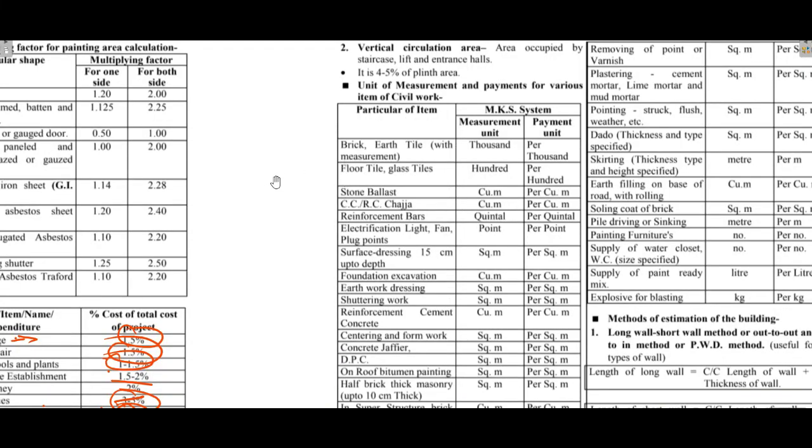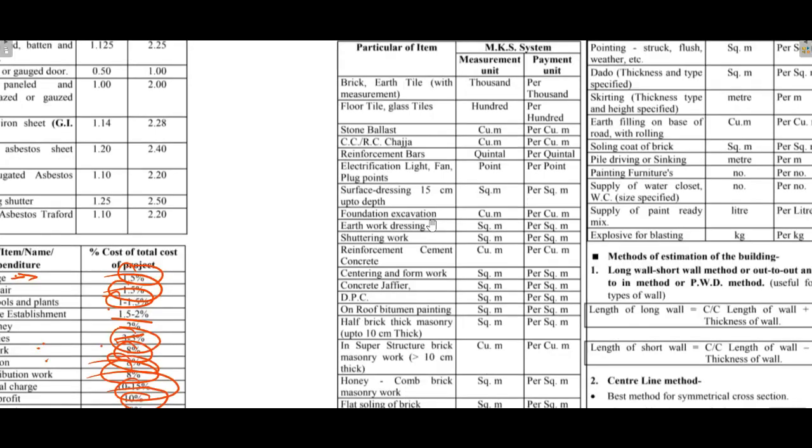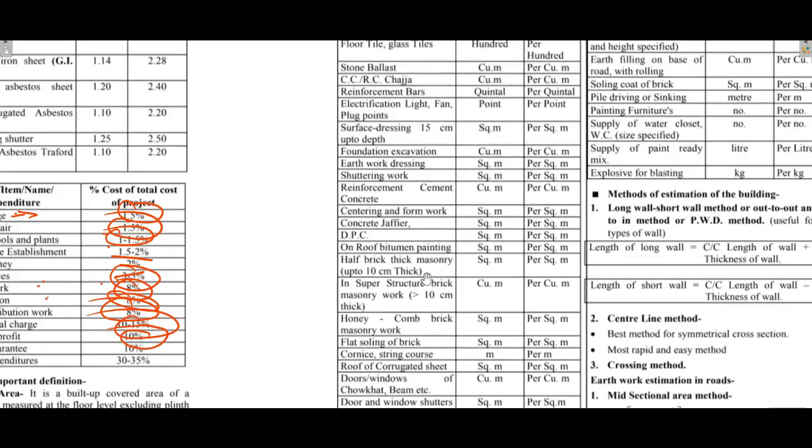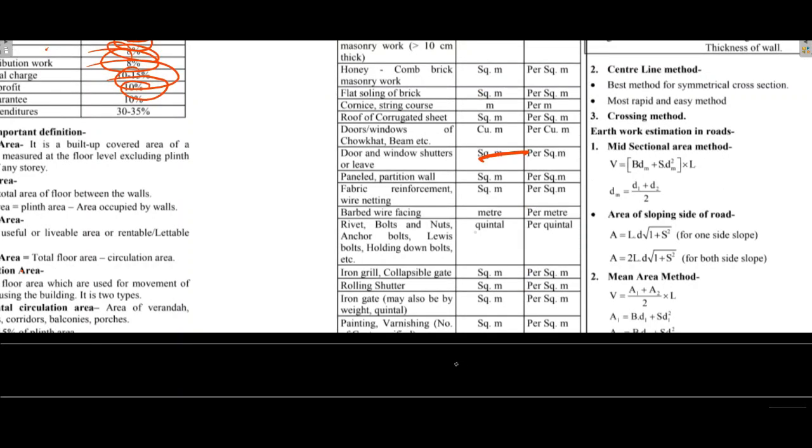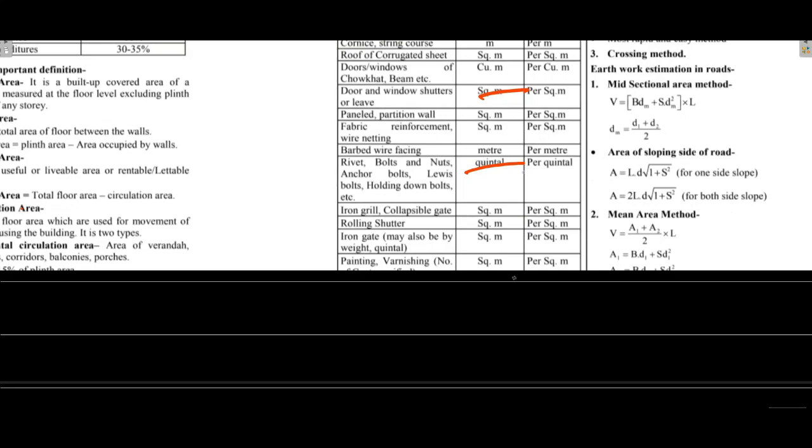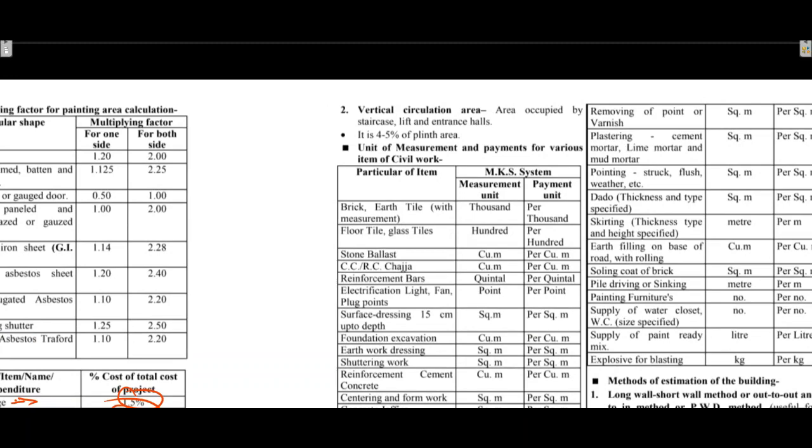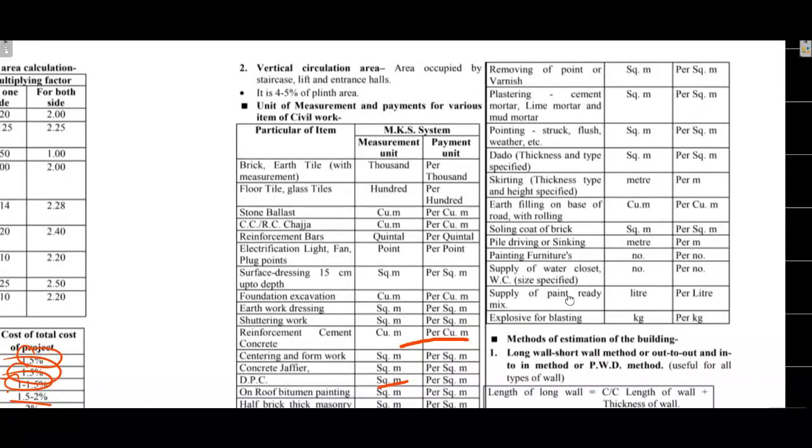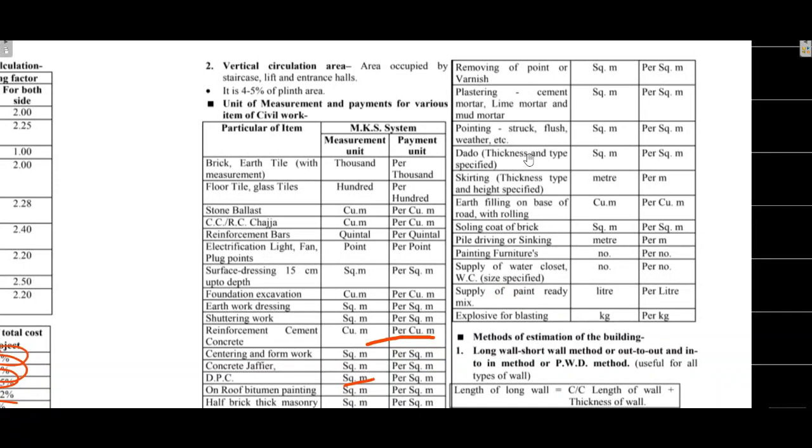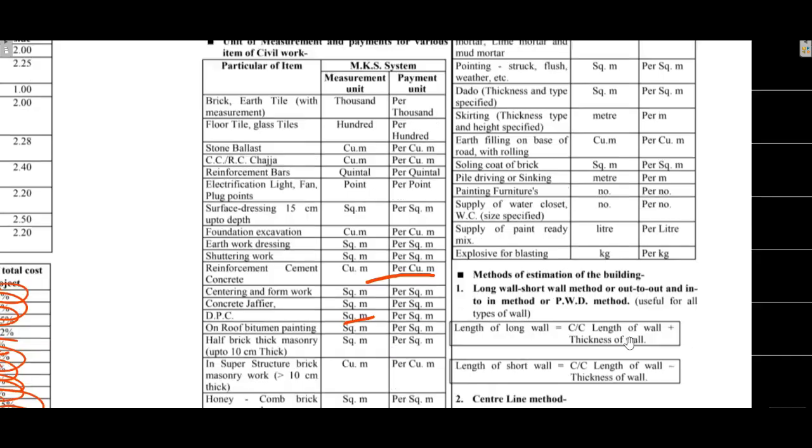Measurement units: brick and tile measurement unit is number, cement concrete RCC is cubic meter, plastering is square meter, reinforcement cement concrete is cubic meter, DPC is square meter, doors windows and shutters are square meter, painting and varnishing is square meter.